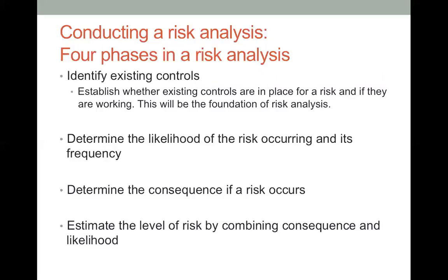In terms of conducting a risk analysis, there are 4 phases. We identify existing controls. Here, we need to establish whether the existing controls in the organization are in place and working. If not, then we need to develop them. We need to get together with the relevant stakeholders and address that, because this will be the foundation of risk analysis.